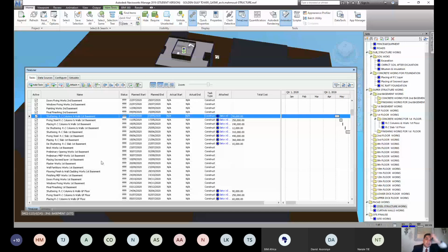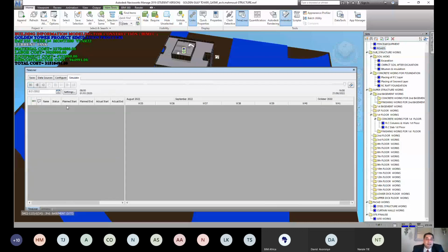And you will see now how we combine this item to the model by representing the same activity here, by these sets related to the model, and combine between this and this. When you finish the combination by attaching here, this attach combines this activity with its related item in the model. Okay, and when you finish all of this, you will get this simulation.